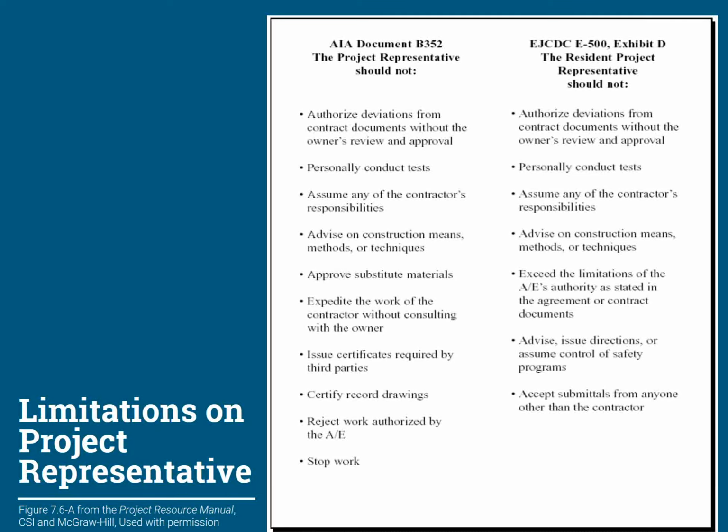It's sort of a lengthy answer, and I start a lot of these by saying the answer is it depends. It depends on the delivery method for the project. It depends on the contract for construction. It depends on your agreement with your client, and it depends on, I'm sure, other things that I'm not thinking of. But substitutions should come before a project is bid so that everyone has equal opportunity to consider that particular product. Often that's not the case.